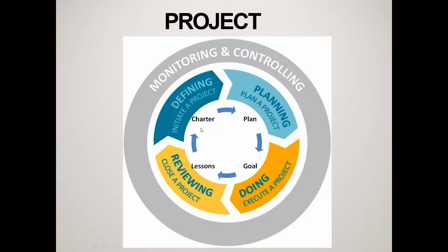If you see, different deliverables are there. We make the charter once we are initiating a project. We create a project plan once we are planning. Once we are executing, we are trying to achieve the goal through the activities listed to achieve it. And once we are closing, we keep track of the lessons. We store those for future projects: any lessons learned, any mistake made, or any risk or issue faced while executing a project.